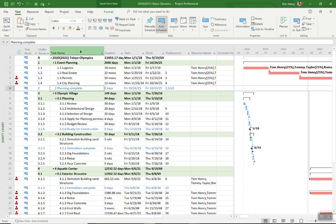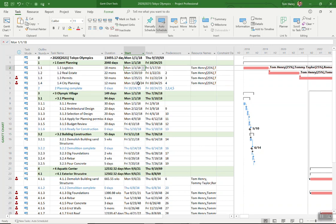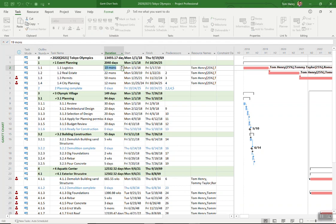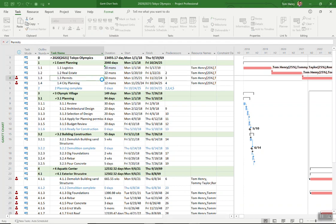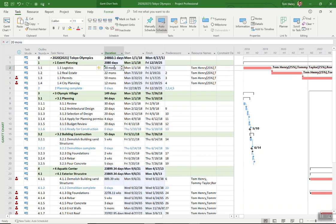Next thing, don't change dates. Microsoft project now that I've got this scheduling engine switched on manages dates for me. So for example if I push out this task by a couple of months you can see in the blue highlighting which means these dates have been affected based on the last change you made. Because I've updated this duration the finished date pushed out that was linked to the real estate permits and planning tasks so they've also in turn pushed out.